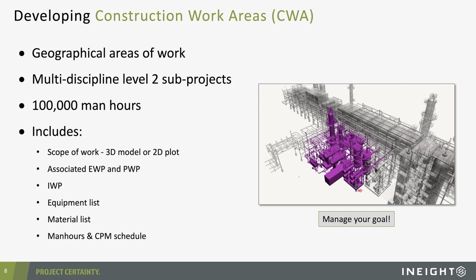Now, secondly, it's all very well to have these perhaps dozen high-level path of construction elements, but as we get into more detail, we need to break those out into manageable areas. So that's where what we call the CWAs, or the construction work areas, come into play.